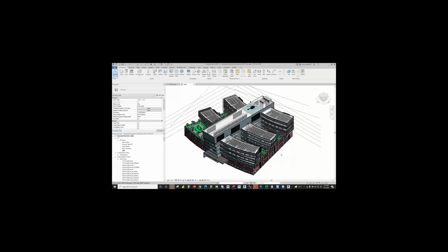I'll add for context that Vince picked up on the notion of the construction plan, and project schedules start out as a plan. I subscribe to the notion that projects really get built with a series of game time decisions on like a 3-week look ahead in order to meet that plan. So we'll be showing visualization of the plan to start with, but try to talk about some concepts for that 3-week look ahead as well.